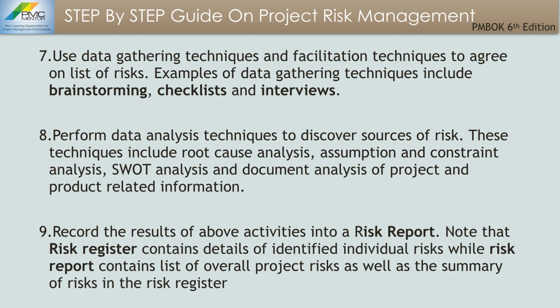Number 7, use data gathering techniques and facilitation techniques to agree on what is going to be your final list of risks. Examples of data gathering techniques include brainstorming, checklists, and interviews.